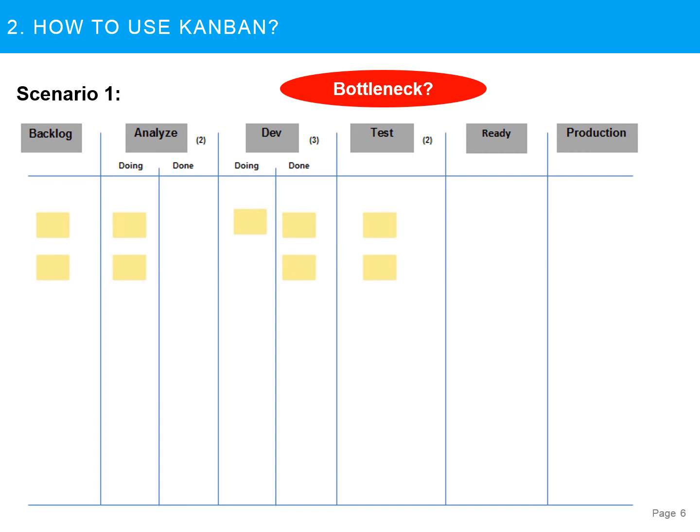So in this case, if the developers are done before the analyzers finish their work, guess what's going to happen? Basically, we're going to run into an idle development issue. So here's a bottleneck or a problem about to happen. This may not happen, but it's a potential problem and you need to keep an eye on it.